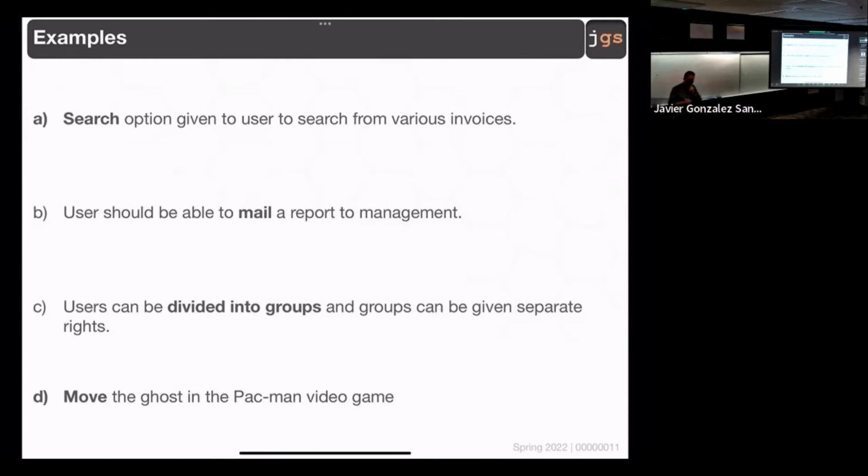Very important point. Remember something. You can be thinking, well, I am going to send an email, and the email is going to be a report. And the first thing to think is, well, I need the report before sending the email, so they are connected. When we talk about independency, having connections is fine. Having connections is okay.